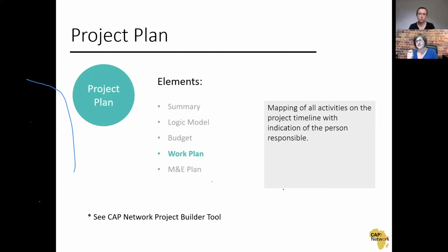It doesn't need to be that you're going to go and get cash from another source that you contribute towards the project. Cost sharing can also be all of the assets and tools and human resources that you already have, that you're either already paying for or don't actually have a cash cost to your organization, that are being used to advance the project.